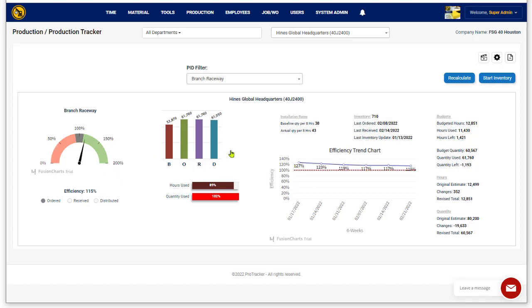We used to track quantity installed. Many of you may remember that. It just didn't take off well. It wasn't accurate. And the biggest problem with that is that you're asking installers to report on themselves. You're asking them to tell you, who's in authority, how much they installed today. Well, maybe they didn't install any today, and it's probably a pretty uncomfortable thing for them to say that. And maybe you're the kind of superintendent that wants to take their head off if they're not hitting a certain number. Hopefully not. And so it just works against production tracking.